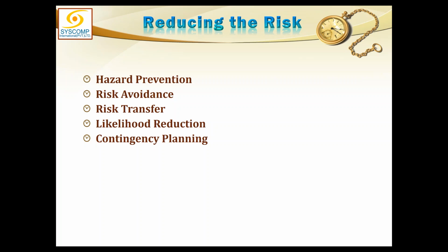If somehow I can take certain measures through which either the probability or the amount at stake could be reduced, the overall impact of the risk will be mitigated to that extent. It is not necessary that mitigation could take care of the complete risk.